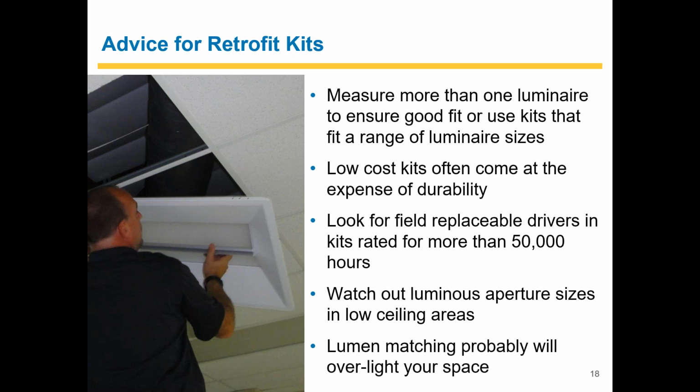Always look for field replaceable drivers, especially in kits rated more than 50,000 hours. The electronic differences between a driver and a ballast are not that different. They're essentially just a high frequency transformer. They're converting AC voltage to DC voltage for the systems that they're running. So they have a lot of the same components that can go bad, primarily capacitors. In that case, they're going to last probably about the same amount of time, 50-ish thousand hours.